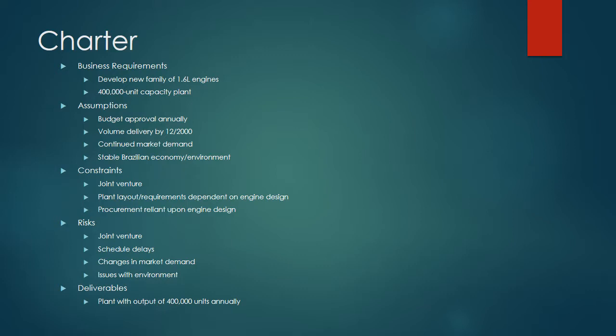Some assumptions with the project: the budget was to be approved annually as it was a multi-year project. Volume delivery, that total capacity of 400,000 units, was to be delivered by December 2000, assuming there's continued market demand and a stable Brazilian economy and environment.